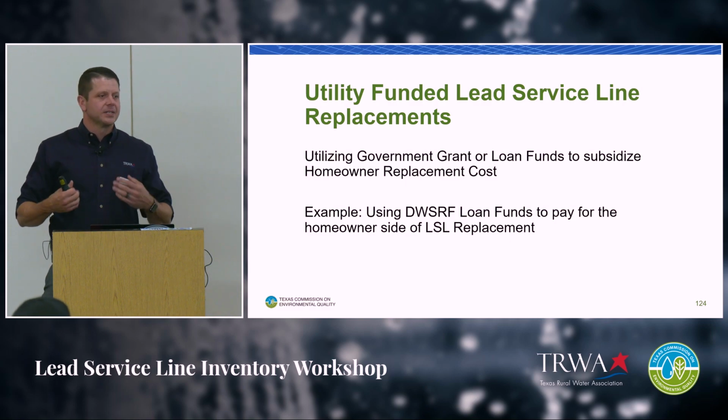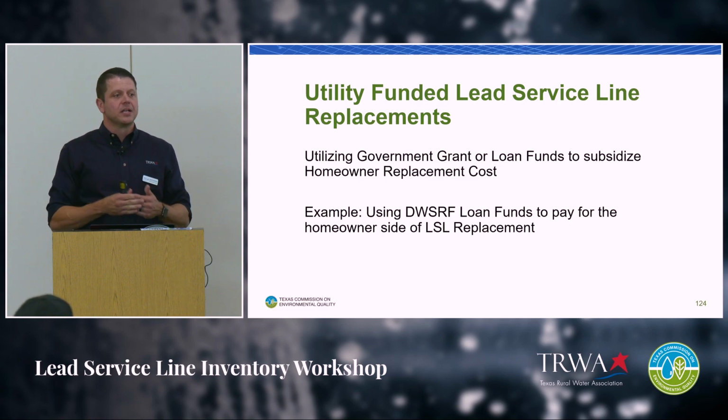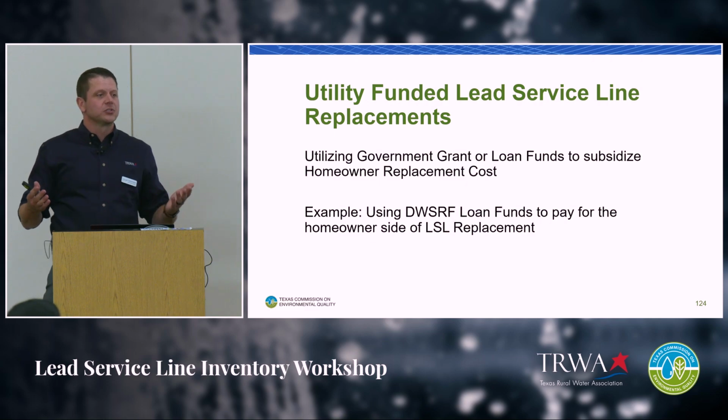We've had many occasions in my past where I just tried to help someone out on the private side of the meter because it was there, I was just trying to be nice, and from then on, my utility is responsible for that particular valve or that piece of pipe that we helped fix, just out of being nice. So there are some concerns with the liabilities of doing customer side lines. So consider that if it is an option where the utility is going to address the customer line, consider going out for bids, third party, have another company or contractor do something like that.